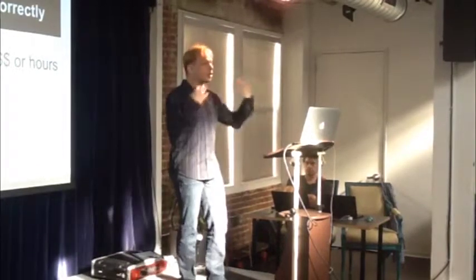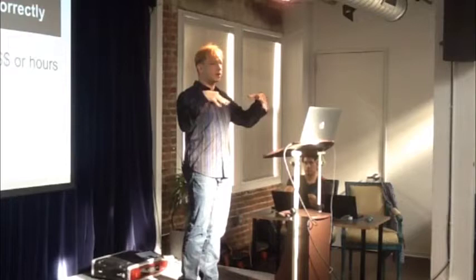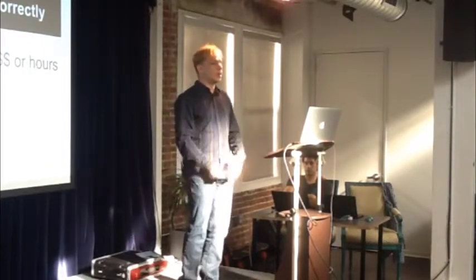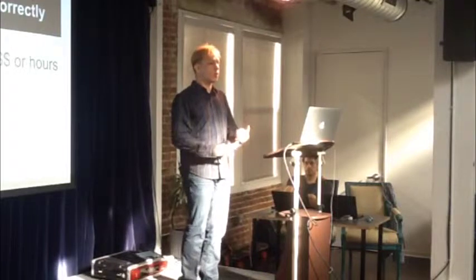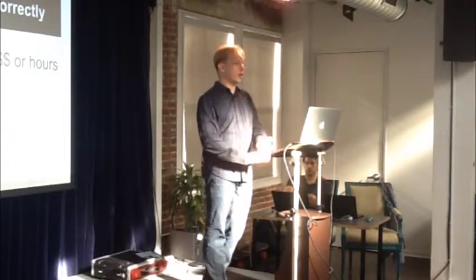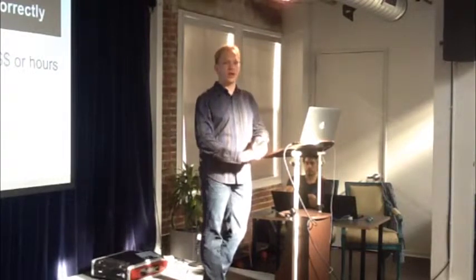But what the developer is forgetting when they're making that calculation is all the other things that go into getting that deployed. It may take them 15 minutes to code, but they also have to test it. They have to deploy it. They have to get it reviewed by the client.